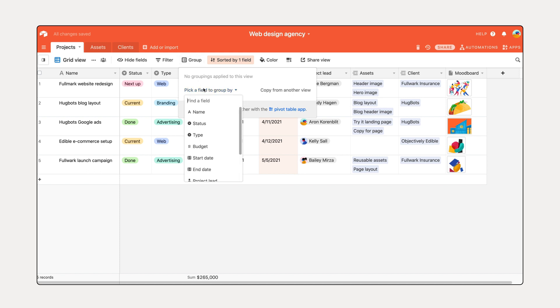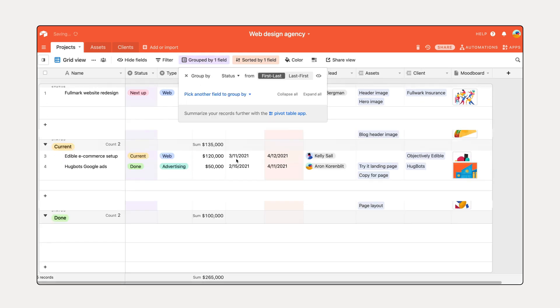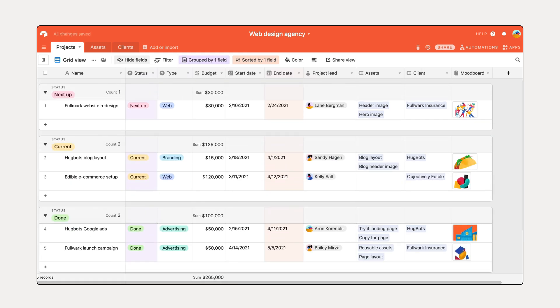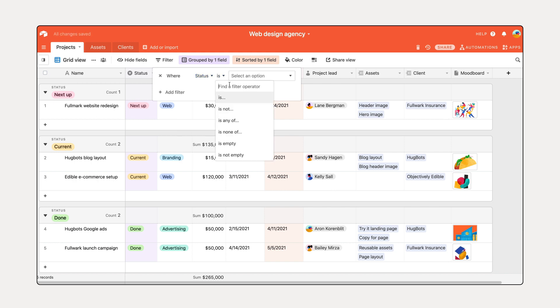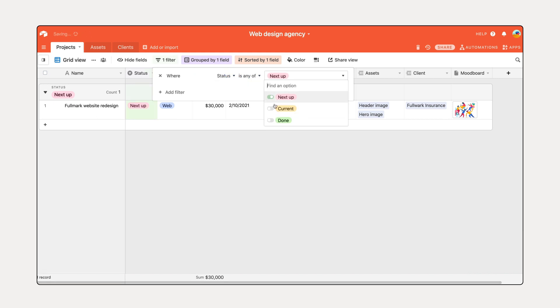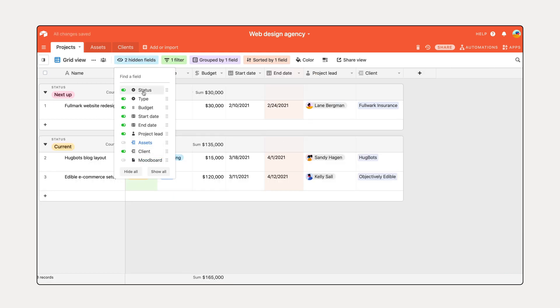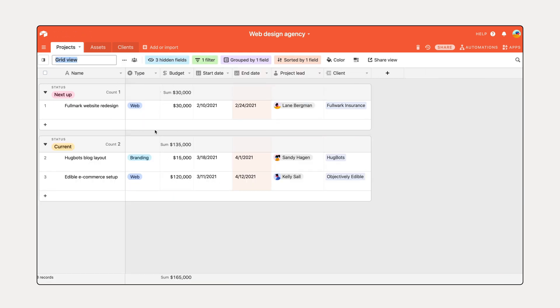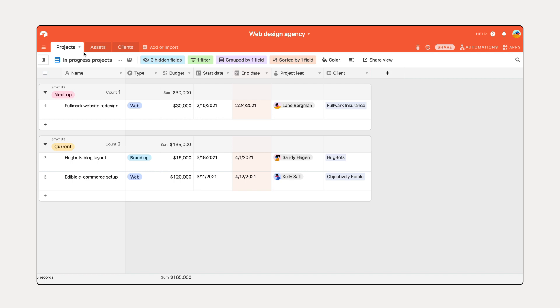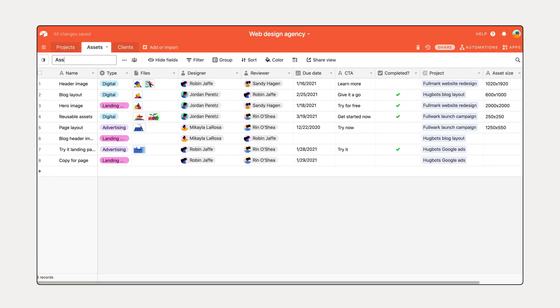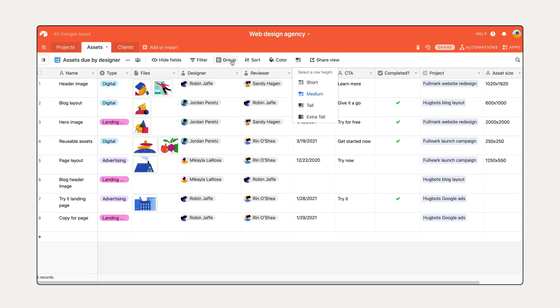Create a project manager view by sorting projects by their due date, grouping them by their status, filtering out completed projects, and hiding irrelevant fields. Create a designer view by showing only assets assigned to yourself due in the next few weeks.